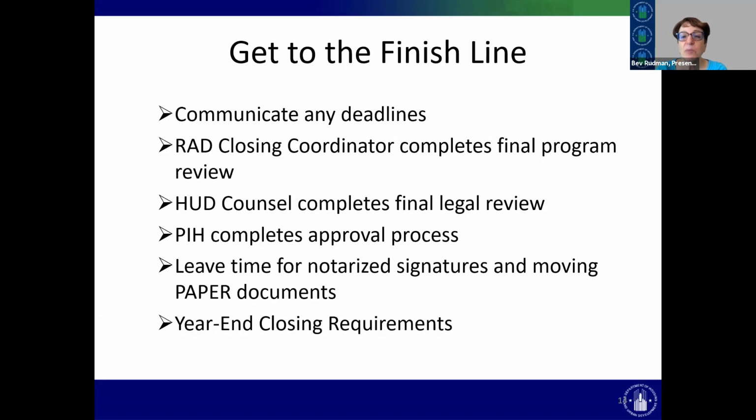Don't tell us 3 days before that you found out something is going to happen in 3 days and you have to get it done. That's just, I don't even know what word to say. It's not going to help, right? Let us help, okay? The RAD closing coordinator completes the final program review. Again, there's some parallel processing going on. The closing coordinator has to say that the program review is complete. The HUD council has to say that the legal review is complete. PIH has to complete the things that they review and work on.